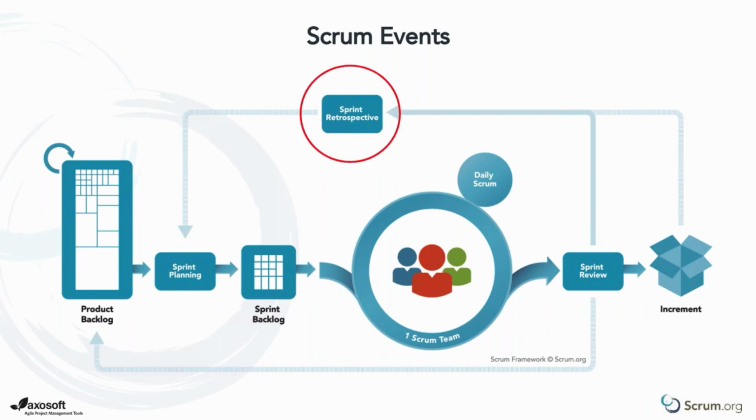The last part of our sprint is our sprint retrospective. At this point, we ask our stakeholders to leave. If there are managers in the room who are stakeholders but are not part of the development team or part of the Scrum team, we ask them to leave. This is just for the Scrum team, because we really want to ensure that we have the opportunity to be open and honest with everybody on the team. This is where we walk through the last sprint and look at what happened, not from a what did we deliver standpoint, but how did we work together?